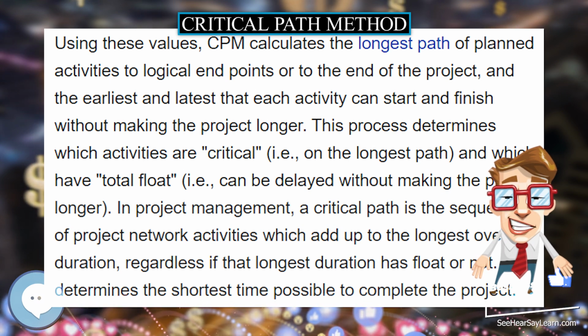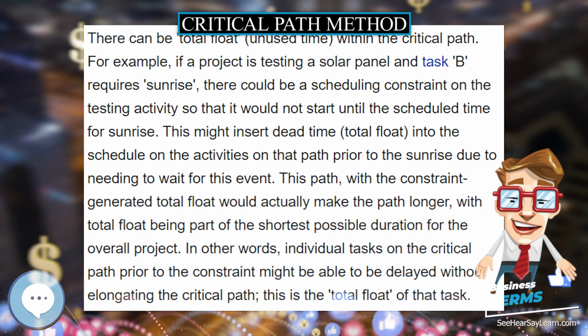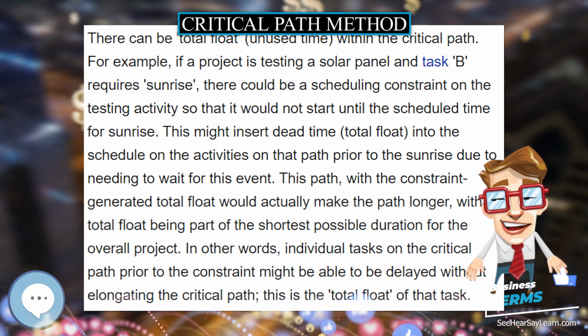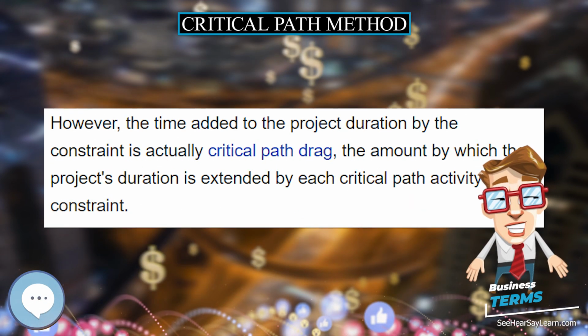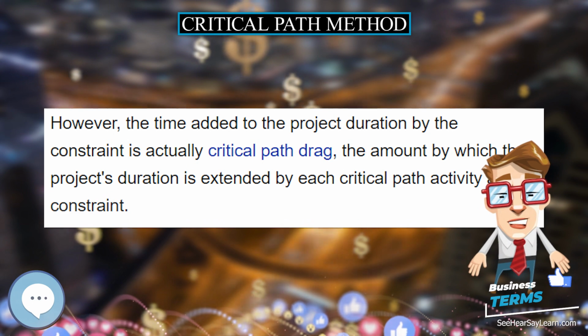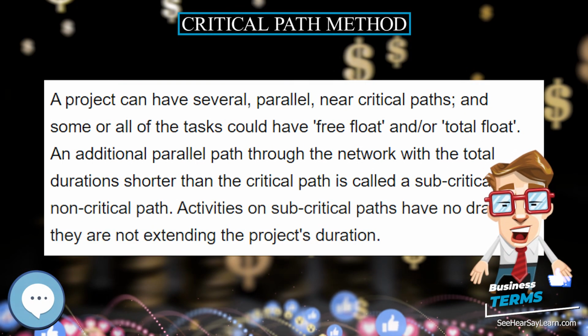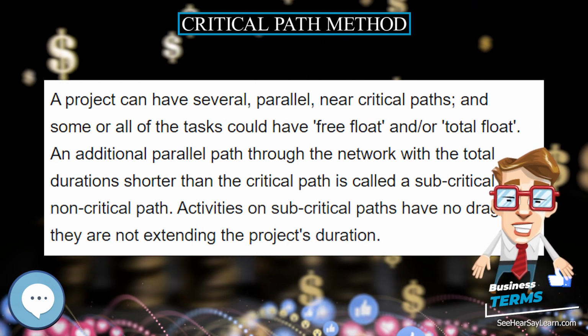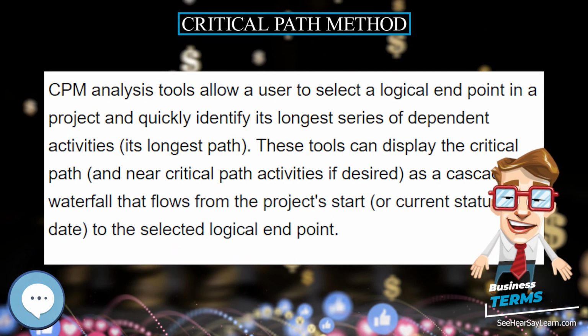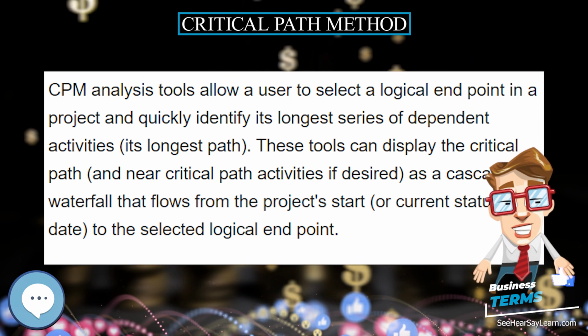Expansion. Originally, the critical path method considered only logical dependencies between terminal elements. Since then, it has been expanded to allow for the inclusion of resources related to each activity, through processes called activity-based resource assignments and resource optimization techniques such as resource leveling and resource smoothing.